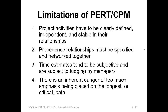The limitations of PERT and CPM include: project activities have to be clearly defined, independent, and stable in their relationships — if there are continuous changes or unknowns, the method cannot be applied; precedence relationships must be specified and networked together; time estimates tend to be subjective and are subject to adjustment by managers; and there is an inherent danger of too much emphasis being placed on the longest or critical path.